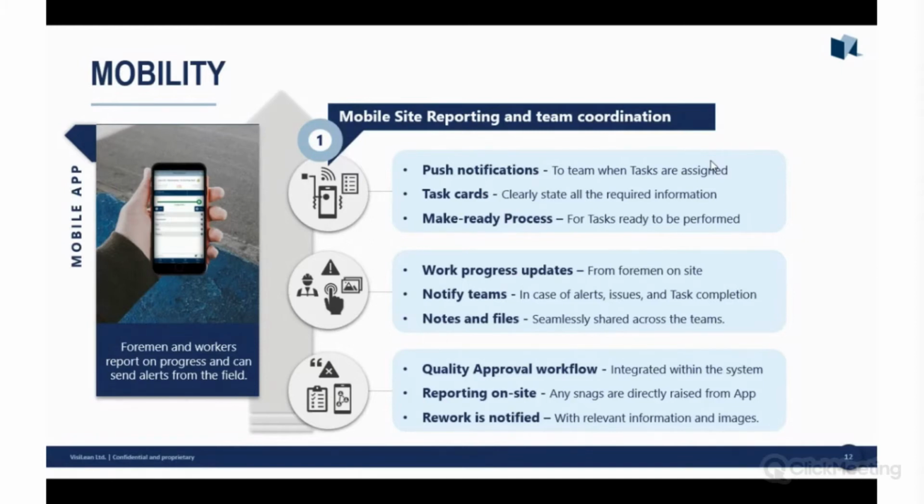We'll know that there's been 10 space stoppages this month. Can we get better at moving materials around or moving packages around? And it's just a very easy tool for understanding where those bottlenecks happened, why they happened, and how we can improve going forward.